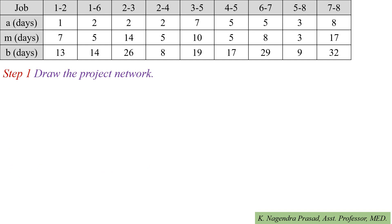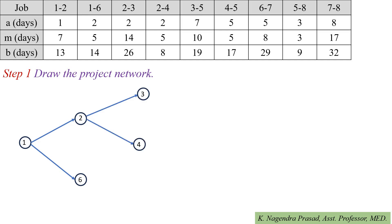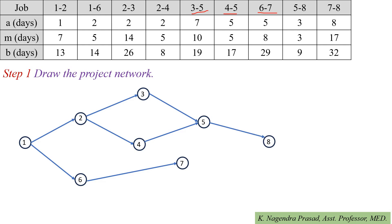The first step is to draw the project network. The first activity is 1 to 2. Then draw activity 1 to 6. Next, draw activities 2 to 3 and 2 to 4. Next activity is 3 to 5 and also 4 to 5. Then draw activity 6 to 7, then activity 5 to 8, and finally activity 7 to 8.